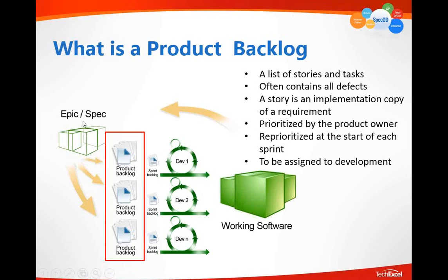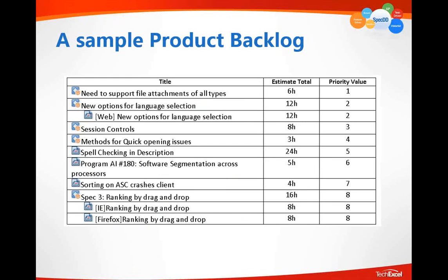So the requirement, you think of more as the way we are going to see our product. It can contain a lot of requirements yet to be committed, representing 3 years later, these are the big requirements we want to commit. They won't be in the product backlog. However, in the product backlog, you have all the defects. You have a dynamic set of stories that need to be picked up almost immediately by your teams.